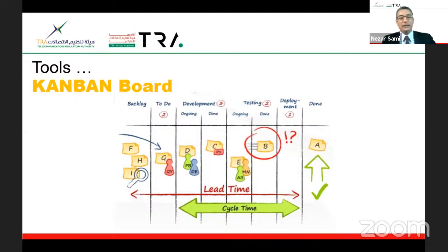So how to define the working times? How to get the appropriate time for each task? We have different methodologies to do so. First, we can ask the expert. If I have the financial guy, the promoter guy, or the techie guy, those are the experts. Ask them, how long does it take? The other thing is to review the history. If you did it before in any other context, recall this information and try to map it here.